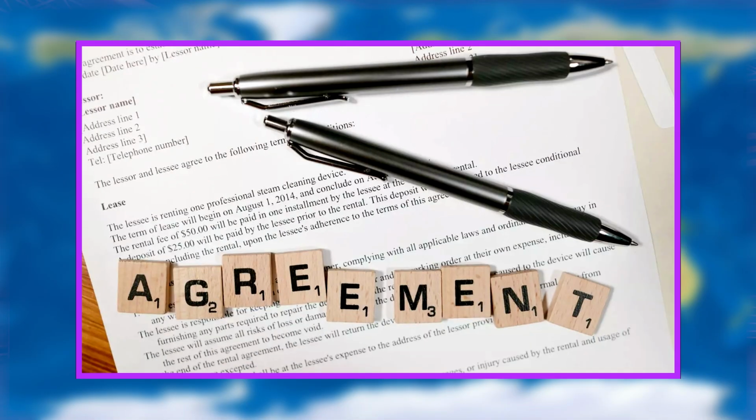In the case of public service concession, a private company enters into an agreement with the government to have the exclusive right to operate, maintain and carry out investment in a public utility for a given number of years. We shall now be discussing some of the PPP models for a more clear understanding of the concept.